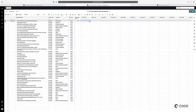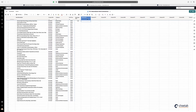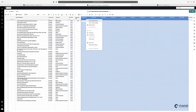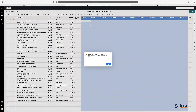Moving on to the second limitation, which is in regard to deleting columns. If I want to delete all these columns, I select them all holding shift, then right-click and say delete. You'll get a message saying a maximum of five columns can be deleted at any one time. So there's a limitation within a grid that you can only delete five columns at any one time.